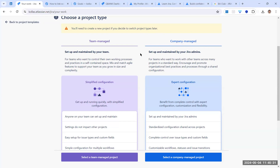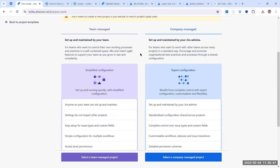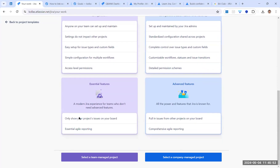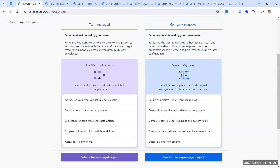Even though everyone may be in the same workspace, other team members won't be able to access a team-managed project because it's restricted to that respective team. It has only essential features — basic reporting showing only project-related issues. If you need to link issues with other projects, have dependencies, or need comprehensive reports and metrics, the team-managed project is not suitable.